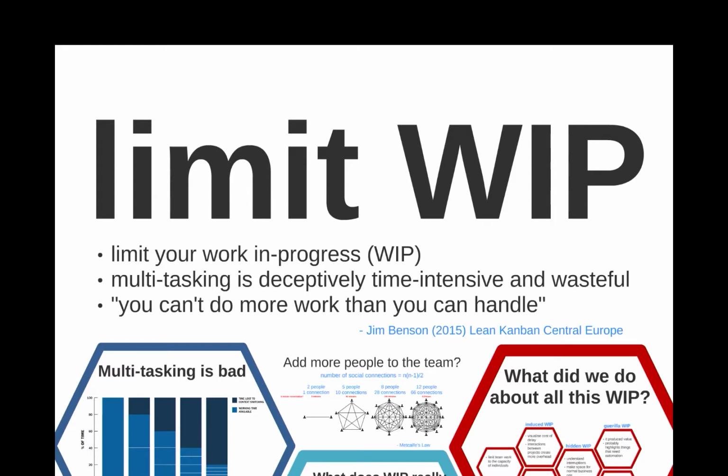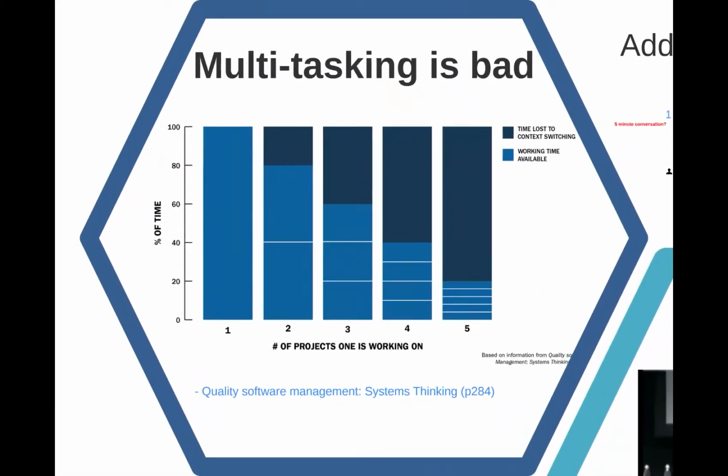Now, that sounds pretty straightforward, but it's not necessarily, there's a lot of work hidden in relation to what people do. It's bad ultimately because of this context switching. For every extra thing that you're doing, you take on roughly a 20% cognitive overhead. So if you do one thing, that's fine. You've got 100% capacity to focus on it. If you're actually doing 2 things, you've got 20% overhead for that cognitive load. So your effectiveness is really only 80%.